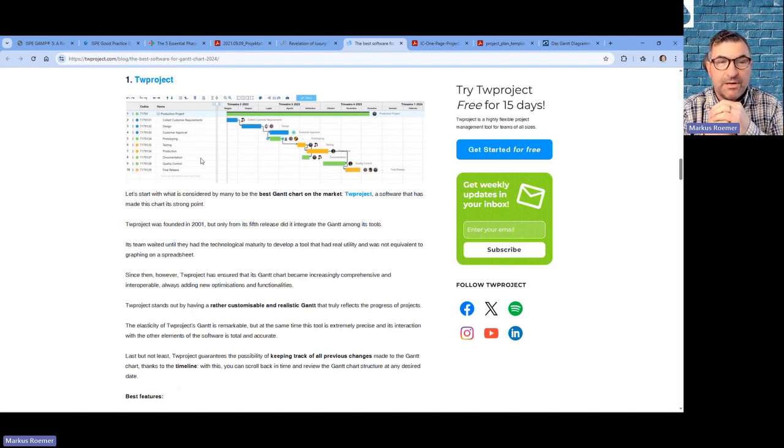If you don't have a project plan and you define this one here as your project plan, you have not defined the scope of the project. You have not defined which persons are required for that project. You have not defined what the goal, the target, of that project is.